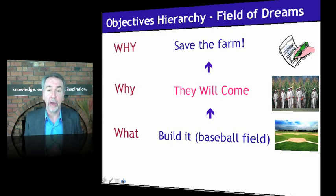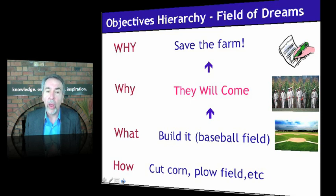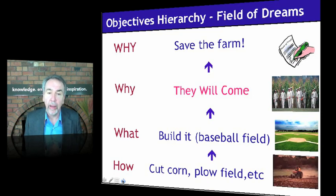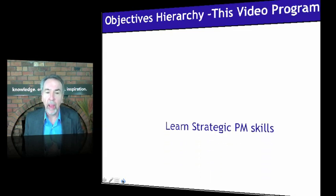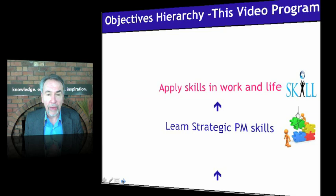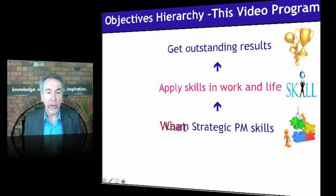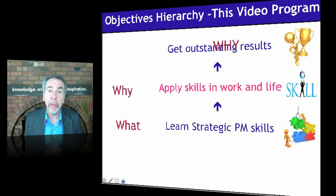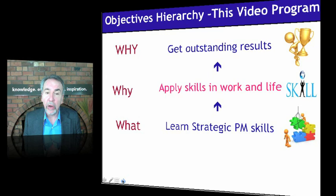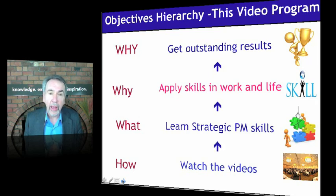So let's put some user-friendly words on this. The what is what we can make happen: build the baseball field. Why? So that they — baseball players and fans — will come. Why do we want that? So we can save the farm. Now we have three levels of objectives; let's call them objectives to get more precise. You can then ask 'how?' and get to activities: cut the corn, plow the field, and so forth. What I see in practice is people getting a simplistic goal and jumping to the activities — the how — way too early. If-then logic connects a hierarchy of objectives.